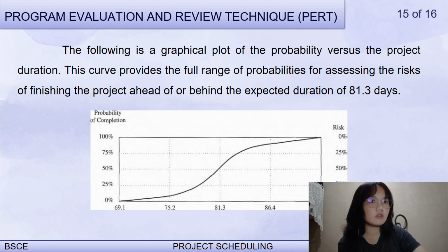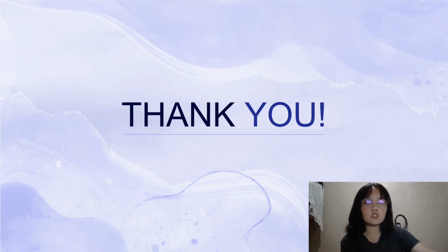For example, it is possible to have another path through the PERT diagram that is near-critical, which would yield a shorter expected time for event 15 and a higher value for optimistic time due to larger variance in the activity in the non-critical path. So that's all. Thank you.